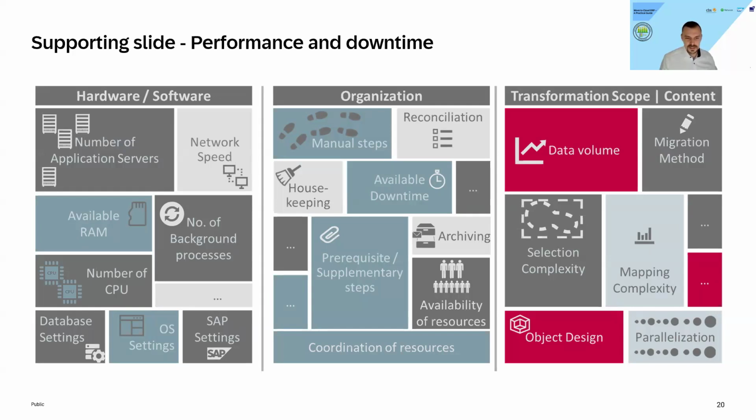Coming to the middle part, the organizational perspective, here we really need to make sure that every resource which has different activities during a go live is available first of all, and is well prepared during a structured cutover planning. So everyone is aware of their task, has the availability, and which is also important, brings some kind of flexibility, because everyone who has already done a go live knows that sometimes it runs faster, sometimes it runs slower. So have a bit of flexibility and do not lose time because someone is not available. This is very important because every hour counts here.